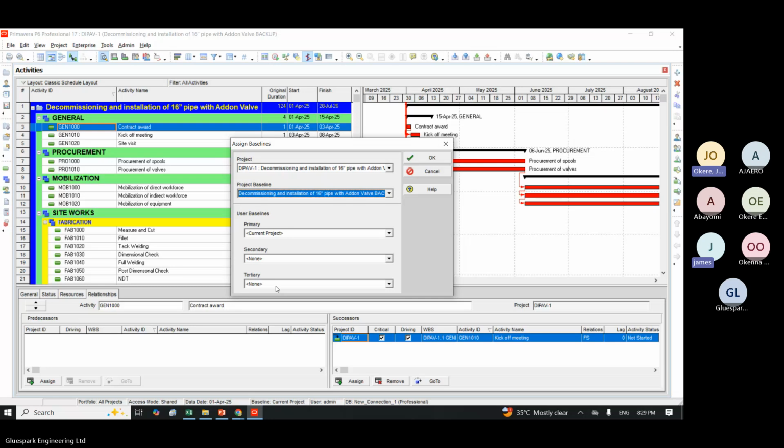So what happened here is that you cannot do the contract award. We wait until his arrival, and on his arrival, we cannot schedule on the 4th. It means contract award as planned has slipped. The question now is, what do we do to make sure that contract award does not impact the kickoff meeting that needs to take place on the 3rd?